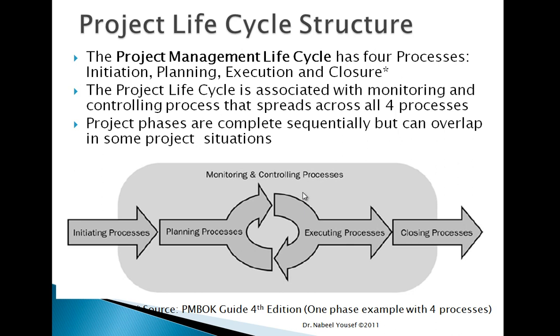Project phases are completed sequentially, but can overlap in some project situations. So when a phase ends, the work transfers to the next phase. The phase end can be reassessed to apply changes or terminate that project if needed. These points can be referred to as phase exits or milestones. They can be named phase gates, decision gates, stage gates, or kill points.